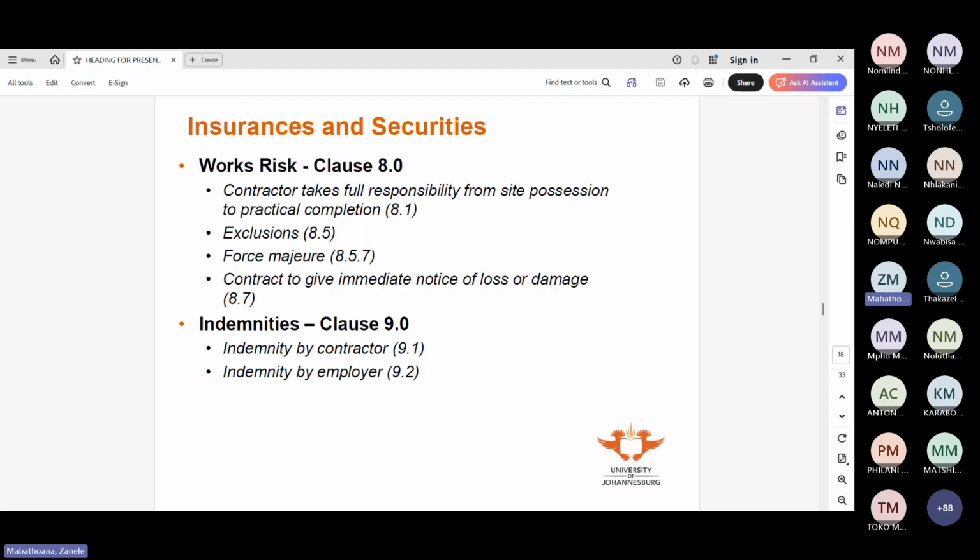However, if the design changes so significantly that it's now like a changed scope. So let's say you were building this very rectangular house, and then halfway through the architects start getting ideas, and they say, with the dining room, we could change this wall to be sort of a curved wall. And then instead of plaster and paint on the outside, we can introduce that stone cladding, and then here we can put random. Those things have to be handled as variations.